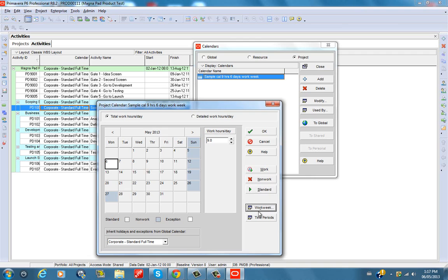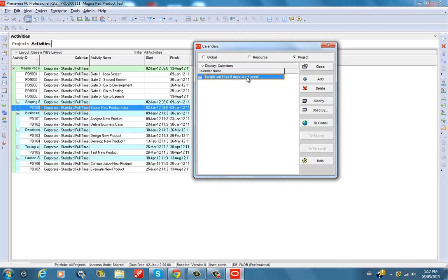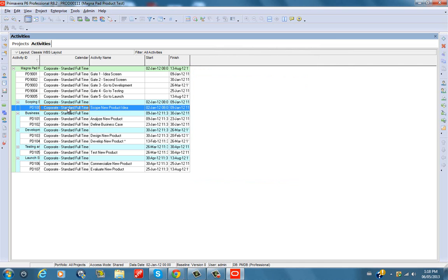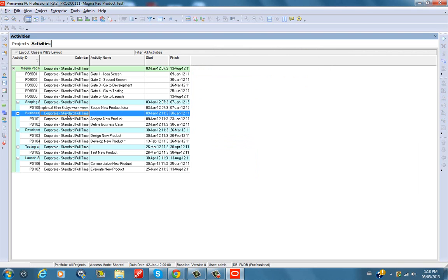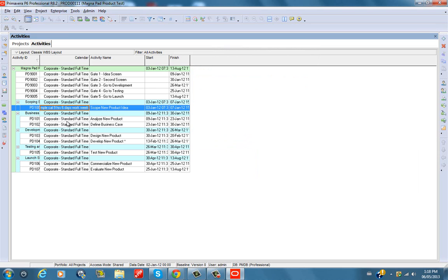Since I don't need much information here, in a situation whereby maybe I want to say one of these days is non-work, maybe a holiday or something like that, I could click on there and click non-work, but I don't need that for now anyway. So I should just say okay. So this has been done. What I just need to do is get it closed. So come back to the project. This is the same project. Then I could click on it, then you say select. So automatically you can see it's already come here.